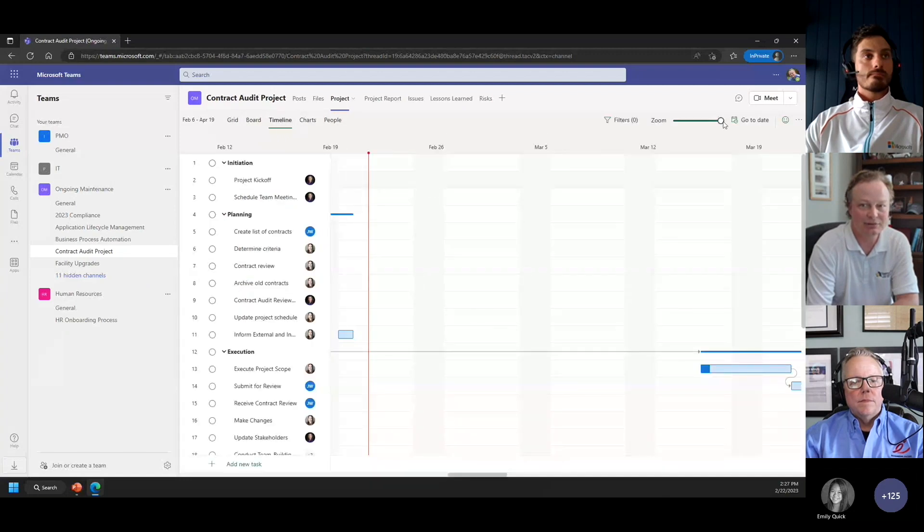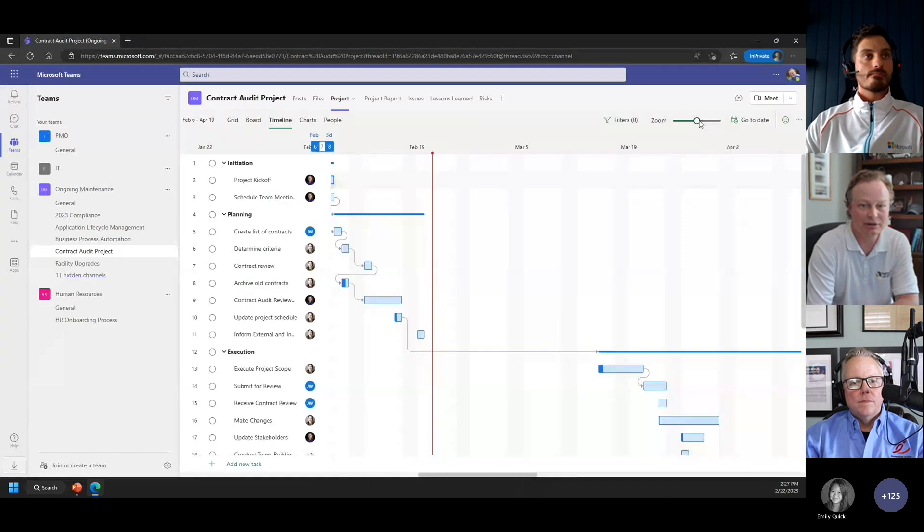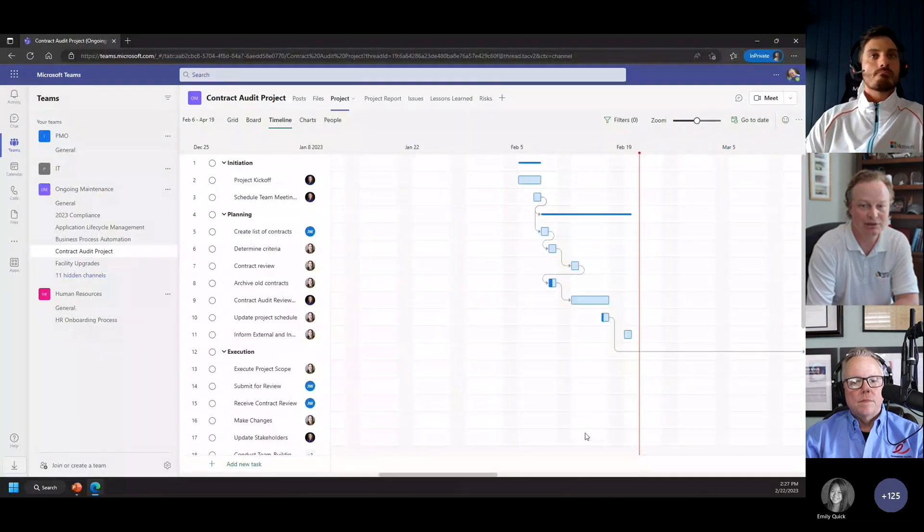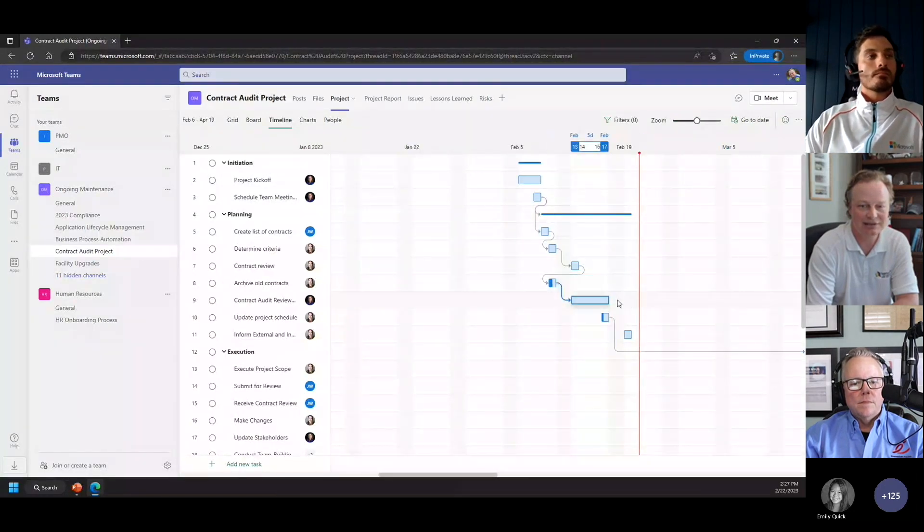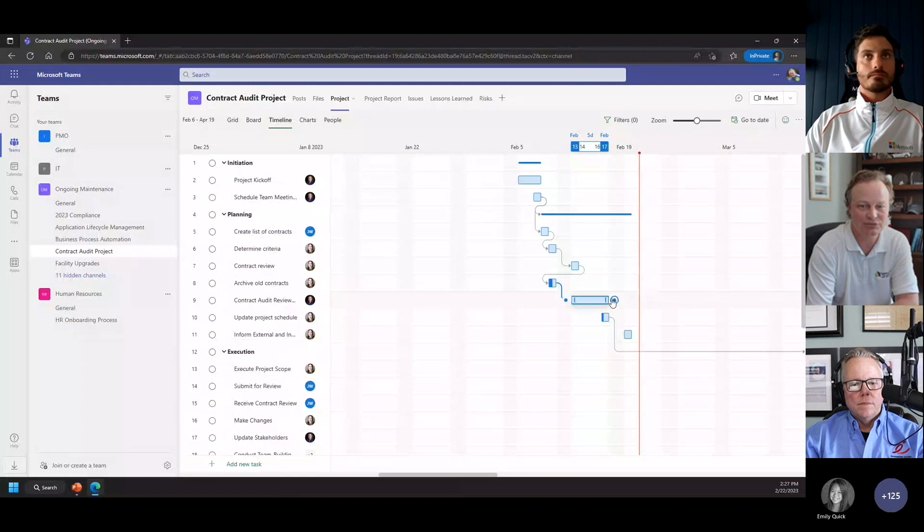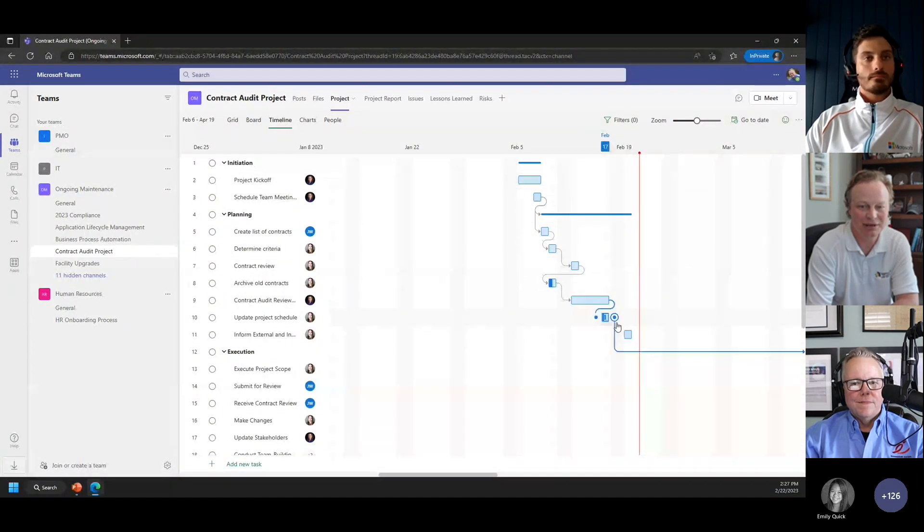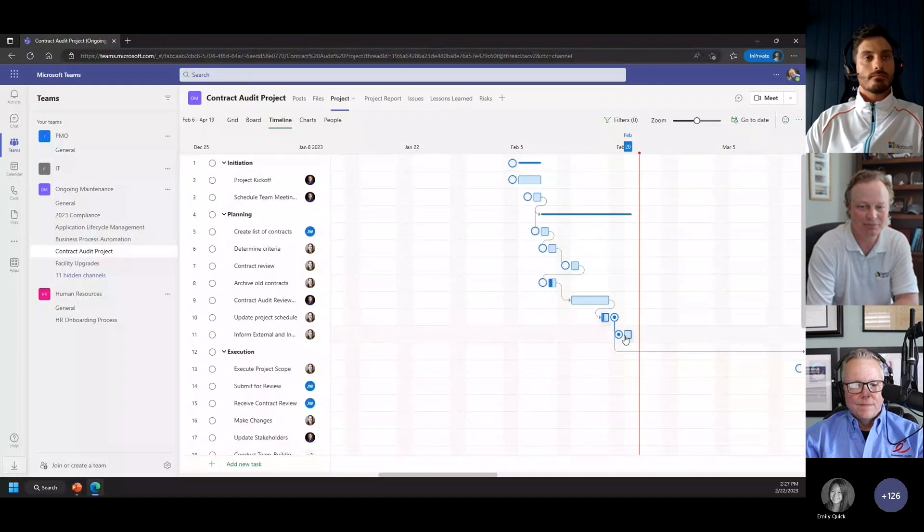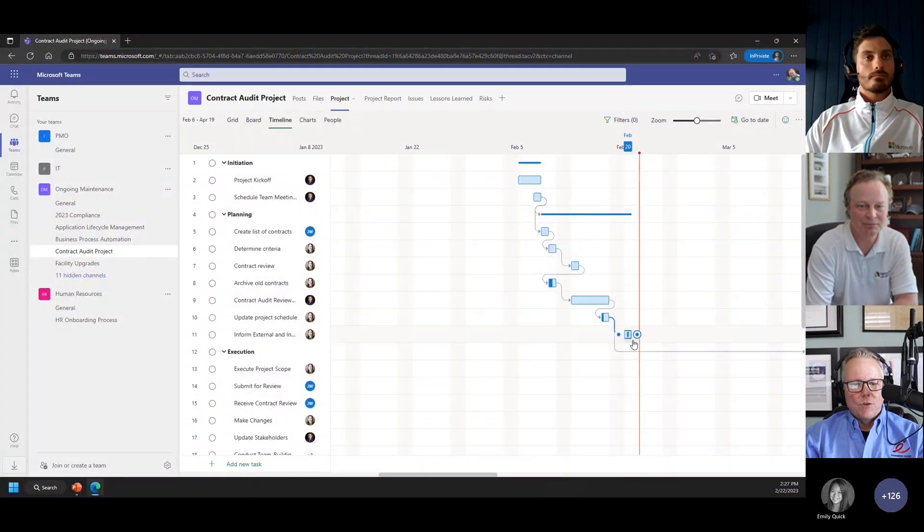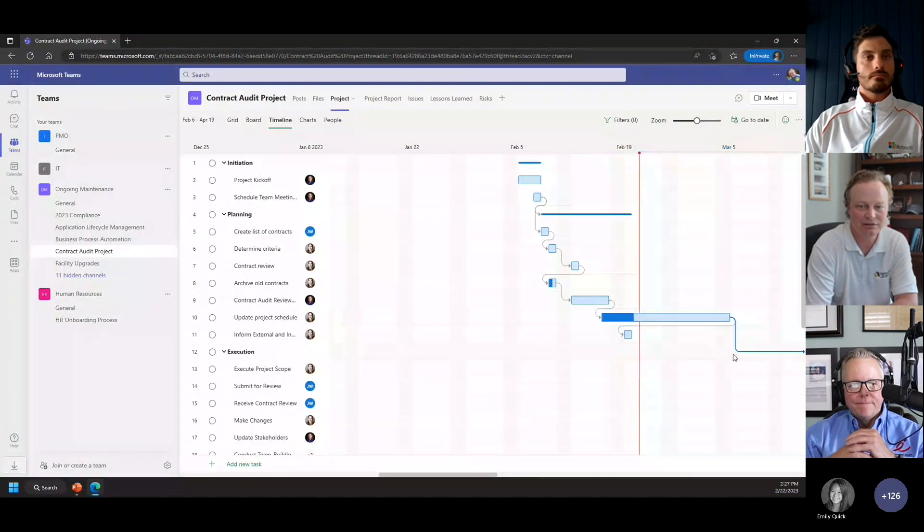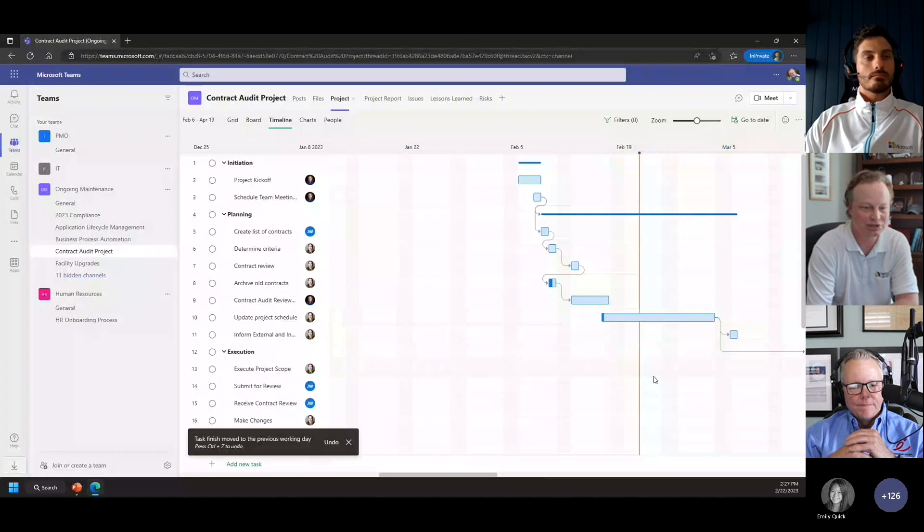I'm going to zoom out of that a little bit so you can see that better. It has the ability to create task interactions right from the timeline. If I want dependencies, I can just map them right here, and then if something goes long, my whole project's going to push out.